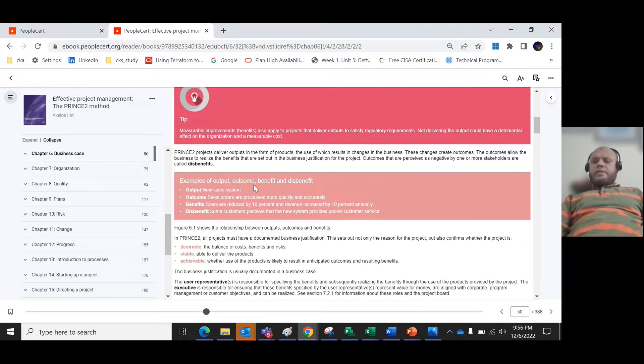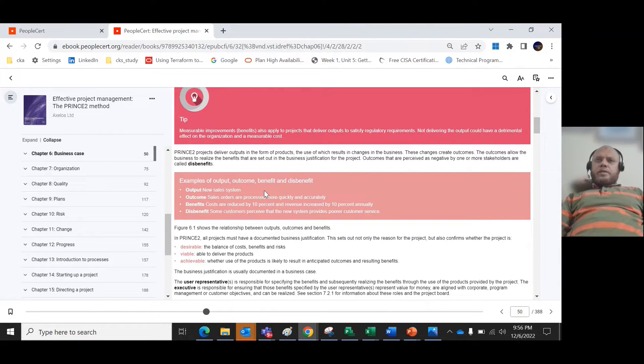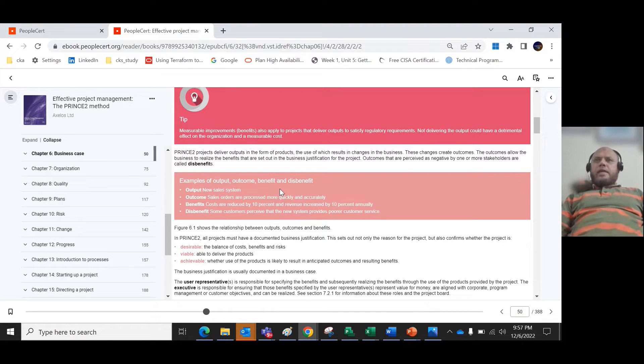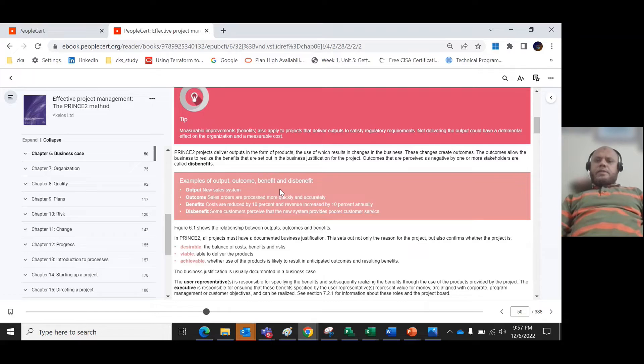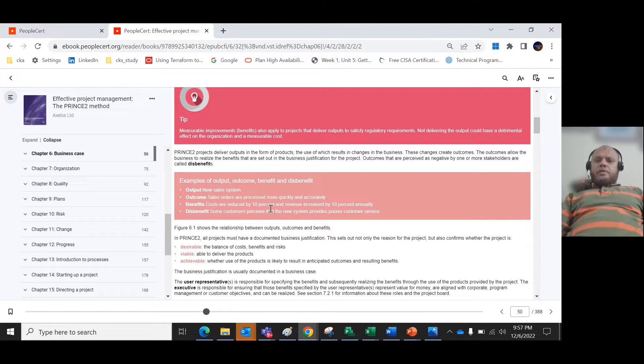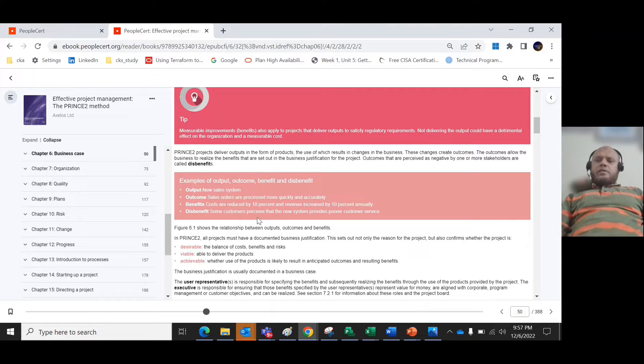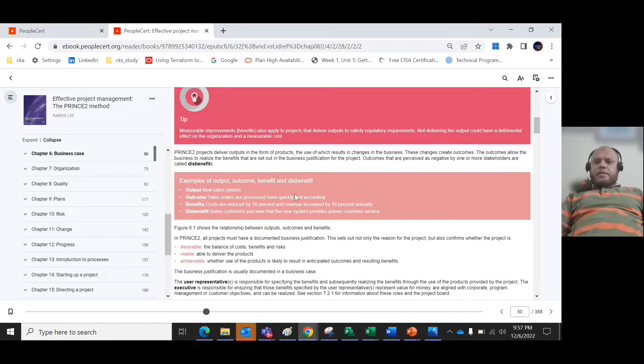For example, what is the output, outcome and benefit: Let's say you have created a new sales system - that is the output. What is the outcome? The sales orders are processed more quickly and accurately - that is the outcome. What is the benefit? Costs are reduced by 10 percent and revenue increases by 10 percent annually. However, some customers might perceive that the new system provides poorer customer service.